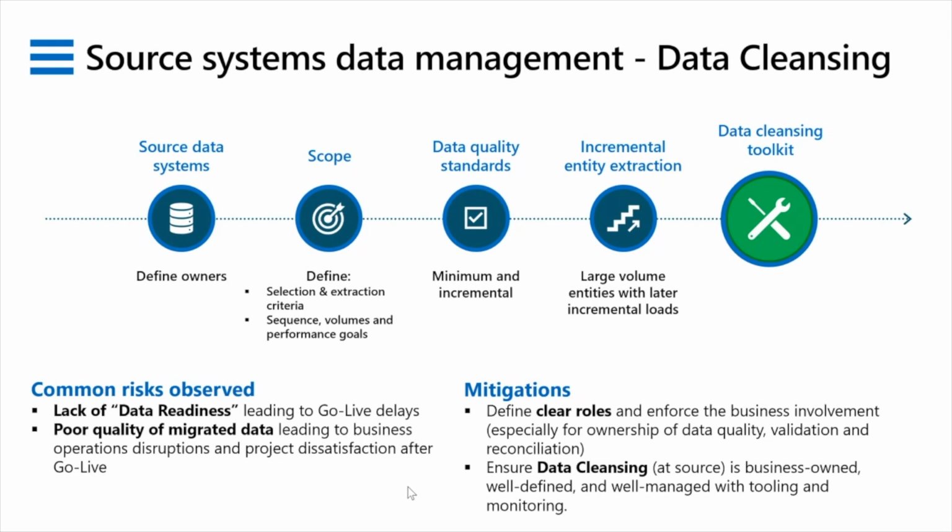I suspect if we did an analysis across multiple different projects, lack of data readiness will be pretty much at the top of the reasons for delays to go live. The other common risk that we see is poor quality of migrated data causing issues in go live. So you've gone live and now the business is picking out the implications of bad data in the production system.